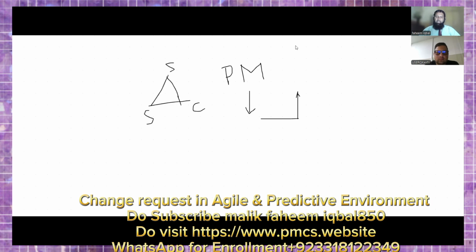And he will check the quality. In the project management plan, he will also check how much quality is affected because of this change request. Resources: do we have resources to do the work on that change request? And risk, procurement, all the plans he will check. And this procedure is called the integrated change process.